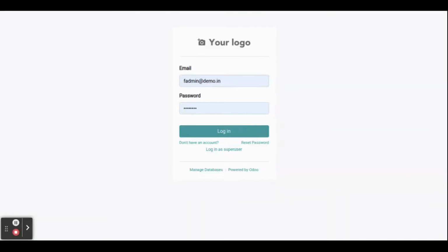Create request for quotation. Before we create and start the project, we need the materials, right? So we can purchase it from our suppliers. To purchase the material, we need to raise an RFQ to each supplier to get the required price. Before we raise the RFQ, we should create the material information in our order system.